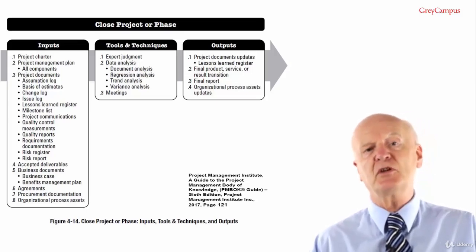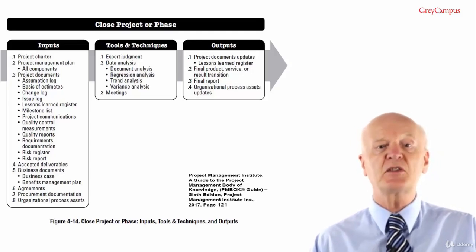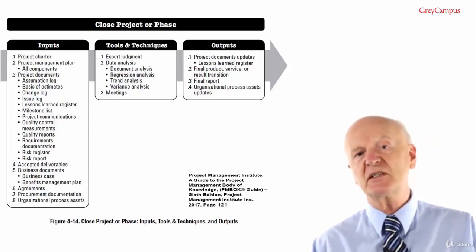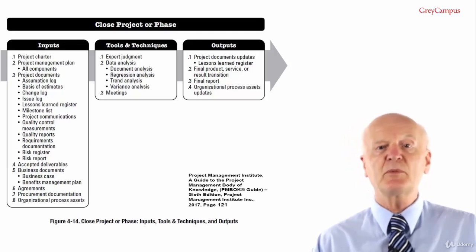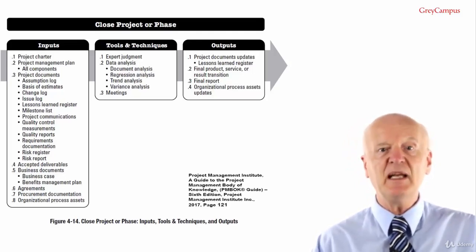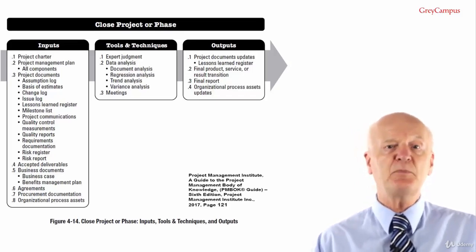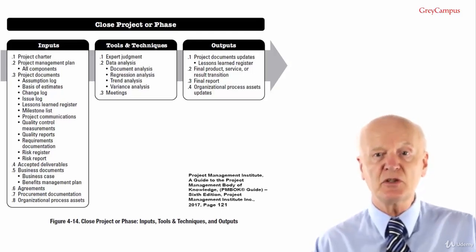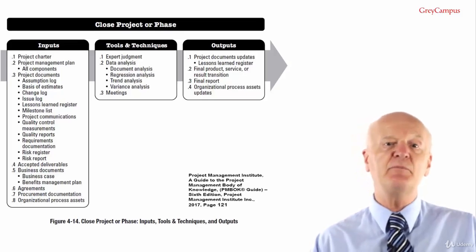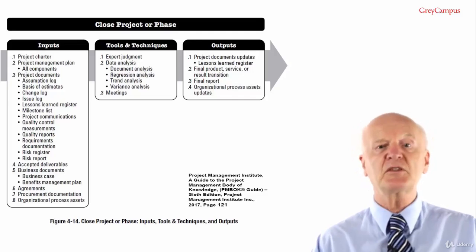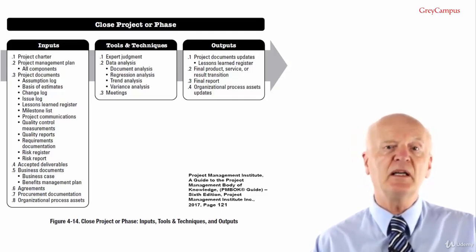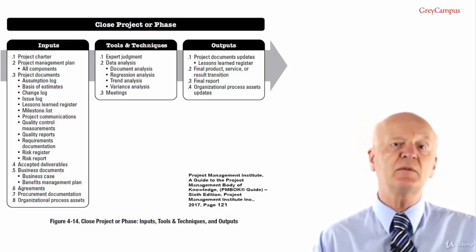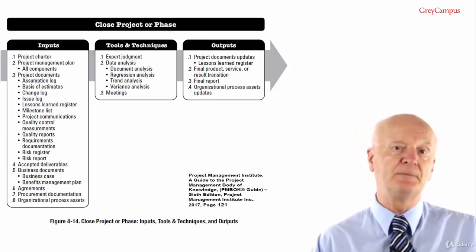Organizational and support documents. Often, especially in the case of information technology projects, the project team operates, supports and maintains a product or service. This is a time when the support documentation is handed over to the support department and responsibility for the operation is passed to the business. This is one of the reasons why you should close the project as soon as possible, otherwise your team will be kept busy supporting and operating the products long after they're required. And the costs for doing this are coming from your project budget. You need to get them shifted over to external support.